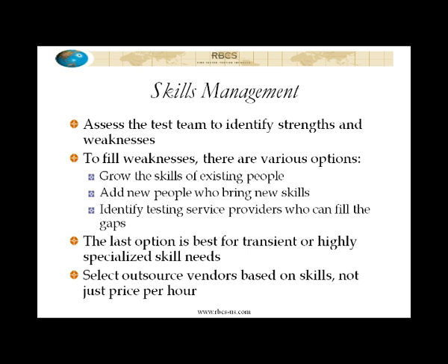You've got your list of skills in the spreadsheet. You've got your people across the top of the spreadsheet. You'd want to just see this big field of 2s. That would be the perfect generalized team. Everybody's able to work independently on any task they have, a perfectly generalized set of skills.